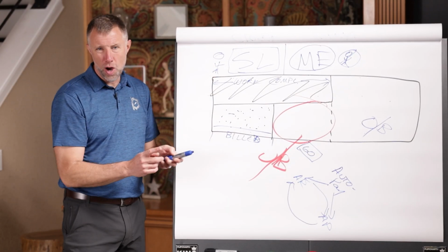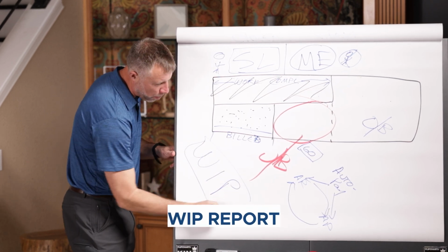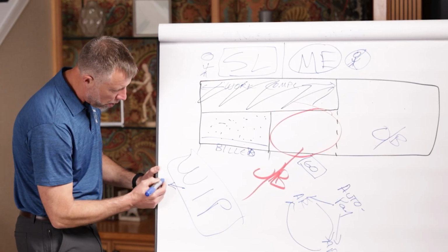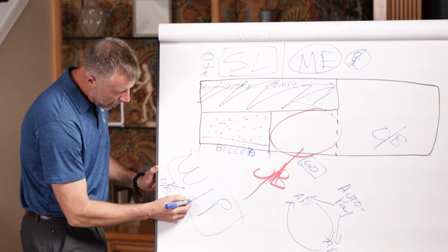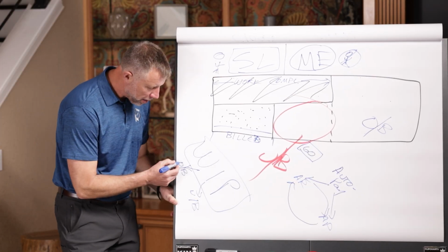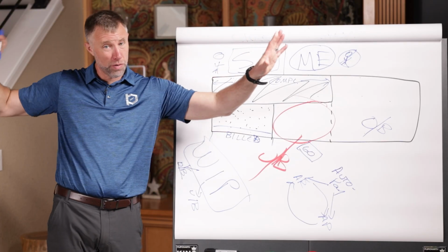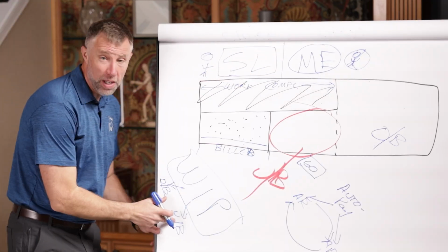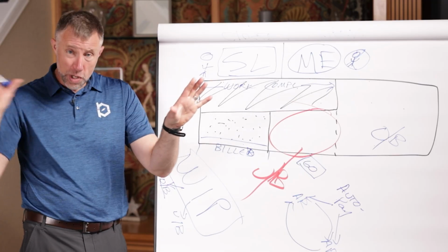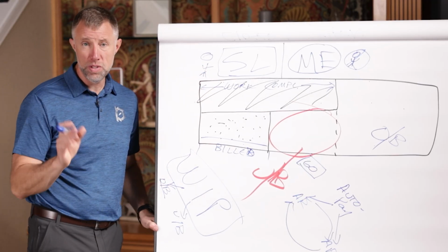Where is all of this caught? Well, it's in something that accountants call the WIP report. That is a work in progress report, and basically it's broken down into two categories. One is overbilling, and the other is underbilling. Okay, in this formula, overbilling is going to tell us, and the alarm's going to go off, hey, you still have to pay some stuff, so don't go spending all this cash. Underbilling means, hey, you're owed some stuff, and so make sure that you catch up your invoicing with that point. So the WIP report is there to tell us two different things.